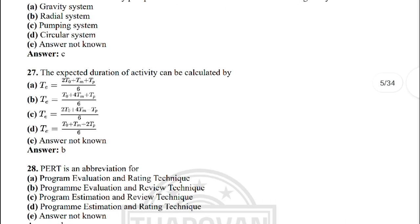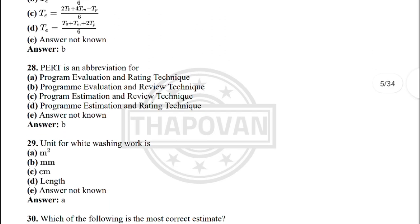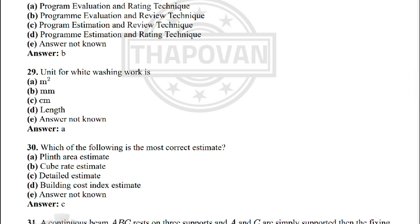Next: the expected duration of an activity can be calculated by — option B: te = (to + 4tm + tp) / 6. Next: PERT is abbreviated for — option B: Program Evaluation Review Technique. Next: unit of whitewashing work is — option A: metre square.